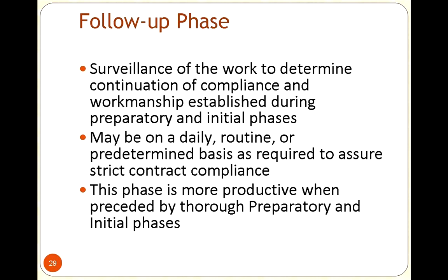Now, starting to close things out. We want to make sure, okay, you prepared, you've installed. Now we want to make sure that we're surveilling this whole process. We want to make sure everything's staying compliant and that there was good quality work. And we would have some kind of a routine that we would follow, not too closely. We didn't want you to know we're going to be there every Monday at 2 o'clock. But there's a possibility we could be there Monday at 3:45. We're just not going to necessarily always tell you.